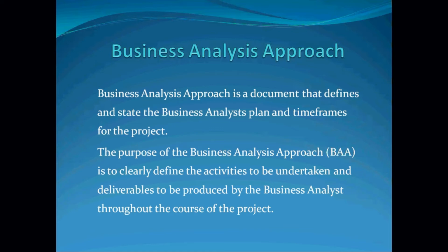And if it's something that is not a BA task, your BA manager will definitely decline that. Sorry, that's not a BA task. We are sorry, we can't do that. But if the BA manager thinks you have the capacity, and there are no resources on the project to actually do that work, he or she may come to an agreement or negotiation with the PM saying, okay, we are happy to take on the work, but it's not a BA task, though we're happy to do it. And because this has not been reflected in the BAA, at least we'll try to do it.